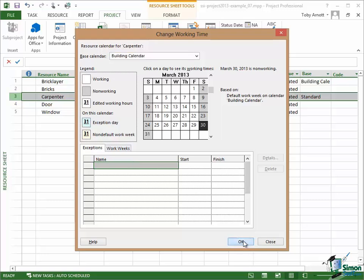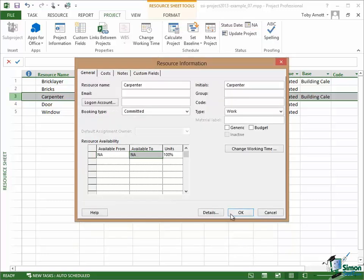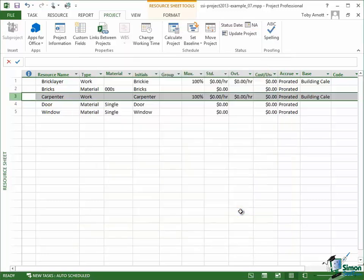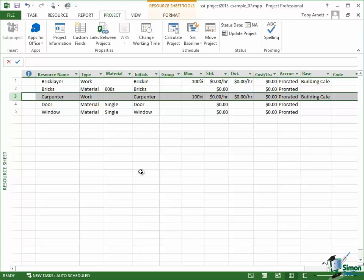Click on OK. Click on OK again and now I've corrected the calendars for the two work resources, the Bricklayer and Carpenter, and they're the only ones I'll need to do. And from now on, any work resources that I add will have their calendars based on the new building calendar and not on the original calendar. So I won't have to go through this process again.